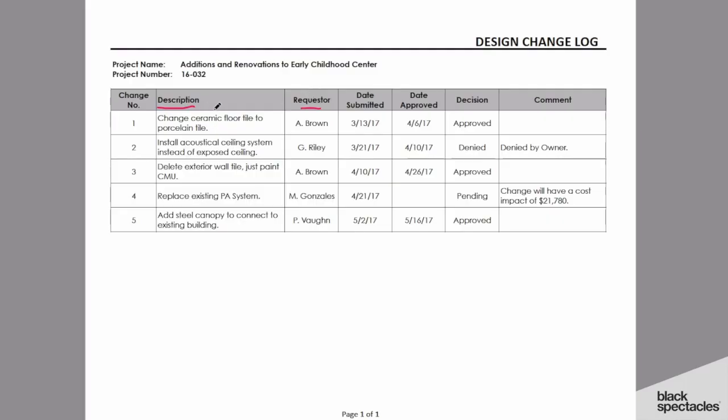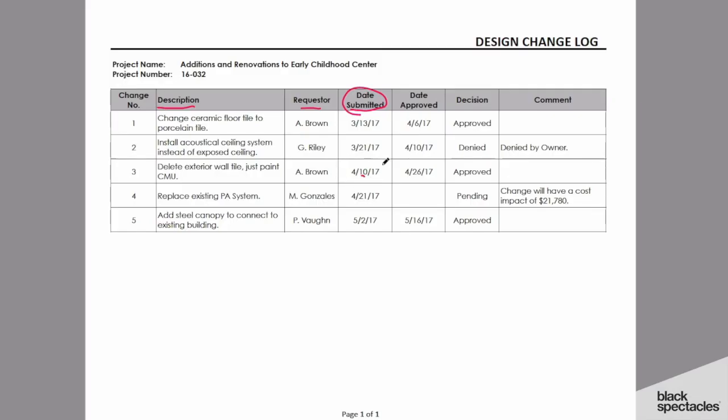So we've got the description, we've got who it is that's making that request, and importantly, we have the date. This is a very key element for a design log. This is 90% of what this is about, saying, all right, the change that was requested in April. So this particular change was requested in April. That means if we go back and look, if you start seeing stuff that didn't respond to that request in May or June, that means something is not right, that somebody wasn't following the order of operations.